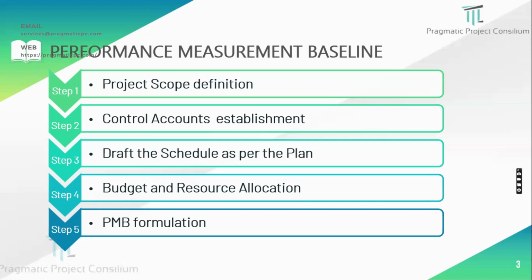If you take an EPC type of contract, we cannot define it in such a way, because the procurement part involves so many other aspects, like ordering material, manufacturing, transport, and so many things. So many factors are involved. That type of activity cannot be limited, and it is not possible to apply something like 8 to 80 hours. So it all depends on how we are going to establish the further move.